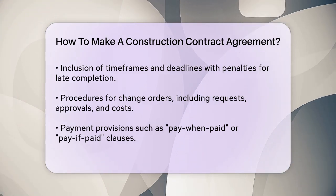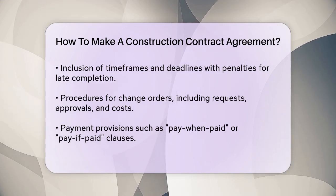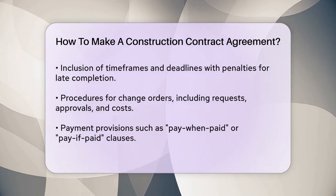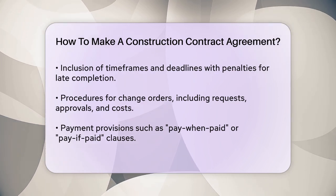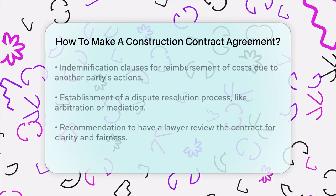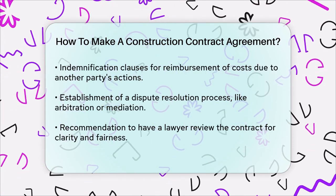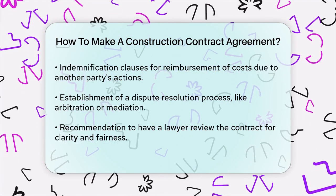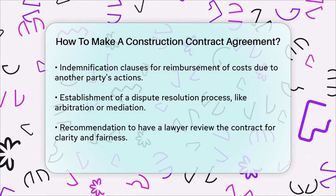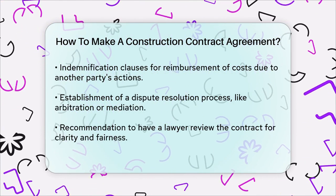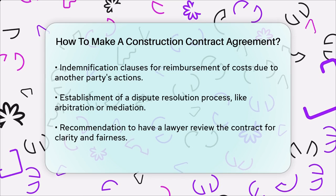Payment provisions are a significant part of the contract. These can include pay-when-paid or pay-if-paid clauses, which specify when the contractor is obligated to pay the subcontractor based on payments received from the owner. Indemnification clauses are also important. These allow one party to seek reimbursement for costs incurred due to the actions of another party. For example, if a subcontractor's negligence causes an injury, an indemnification clause can help the contractor seek reimbursement from the subcontractor.